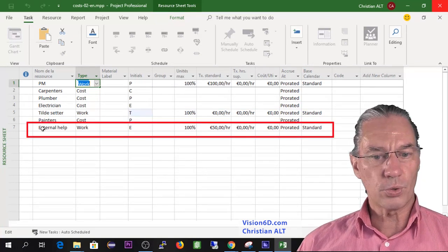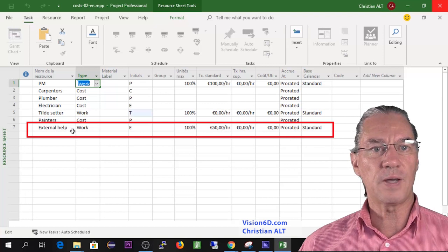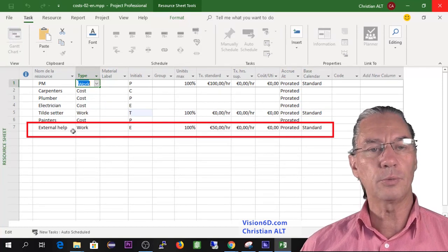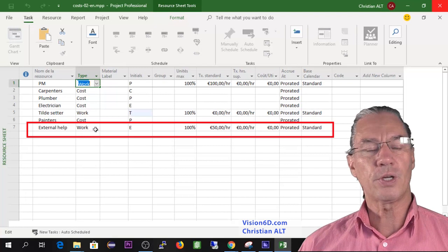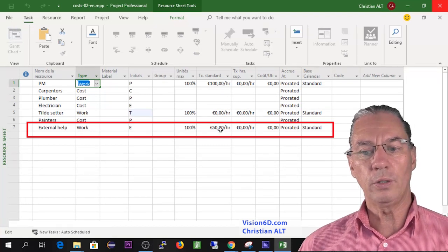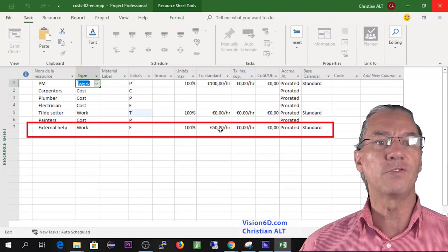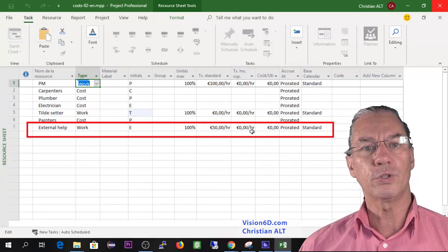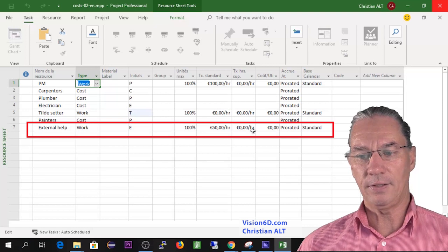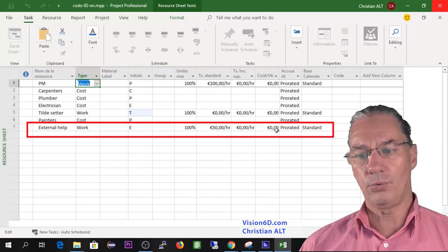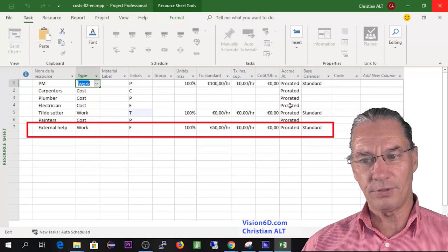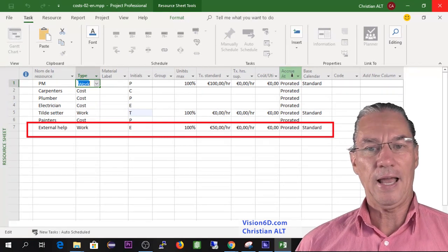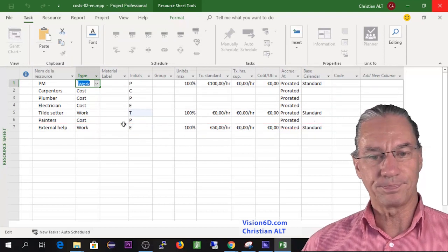The other resource, the external help, is someone that comes to help me in the project and is also considered a work resource. That work resource will be costing the project 50 euros per hour. There is no overtime rate and there is no cost per use of that resource.